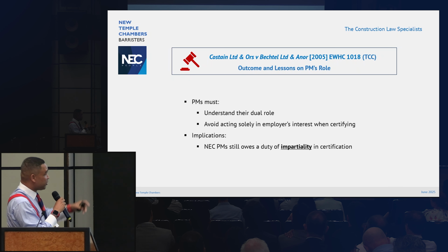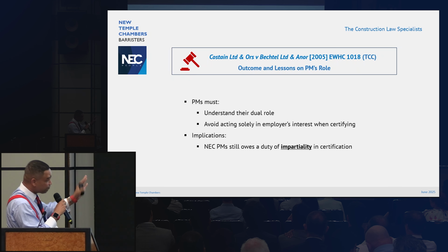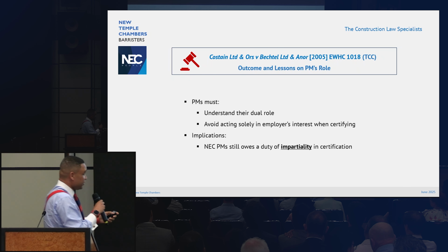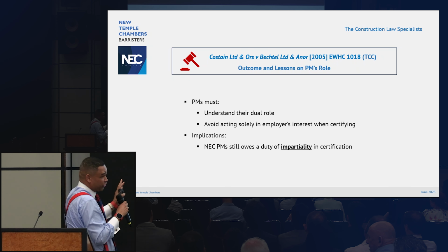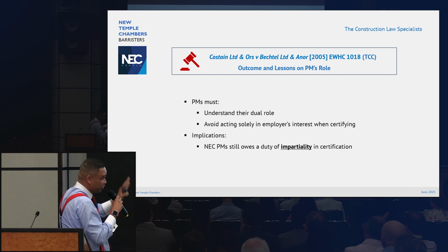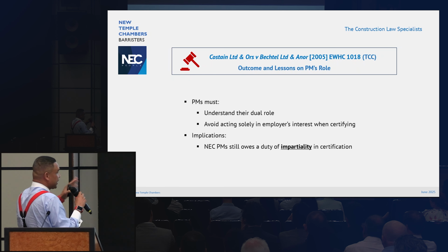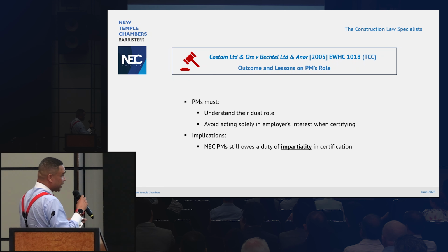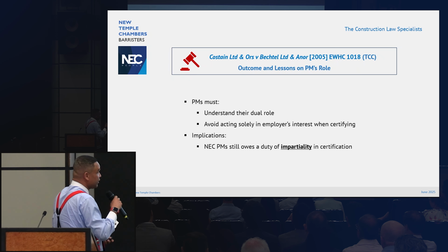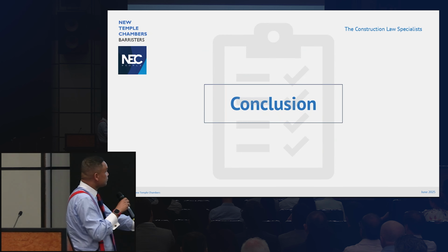They still owe a duty of impartiality in certification, and it applies to NEC, but it applies to other construction contracts, and sadly, I repeat, I've got 3 or 4 cases on my desk at the moment involving certification, and where those in that capacity, PMs or otherwise, are not acting impartially.